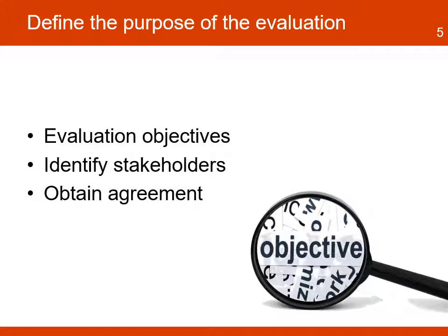The first step includes the task to define the purpose or the objectives of the evaluation. It includes the identification of key stakeholders that need to be consulted and that will participate in the evaluation process. In this step, the project manager will consult the requirements that are most appropriate for the purpose of the evaluation, set out either in the donor or the organizational policies and procedures.